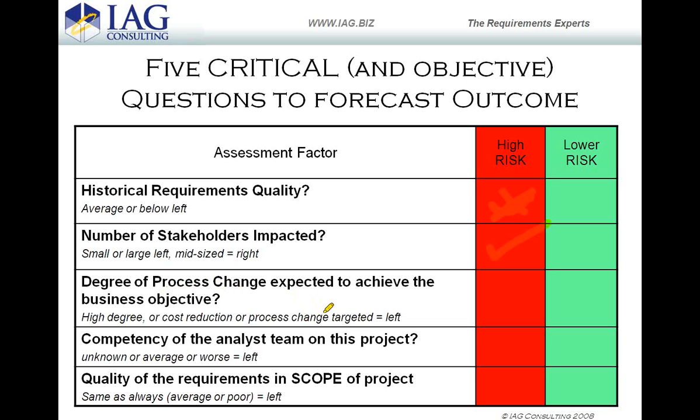The degree of process change expected to achieve the business requirements. Remember what we had talked about. If you've got very high degrees of process change expected, what happens? That's right, very high risk.